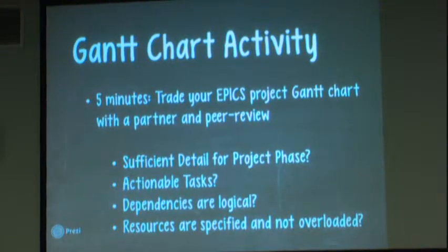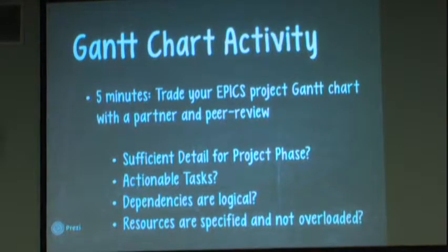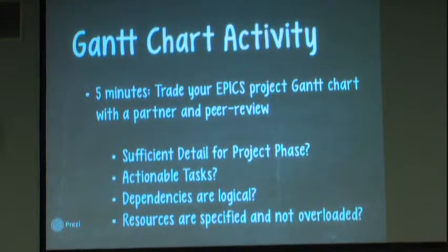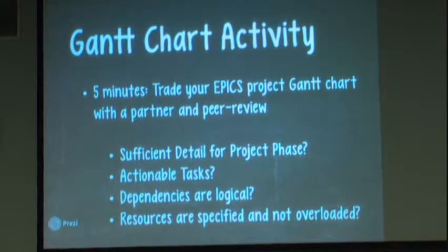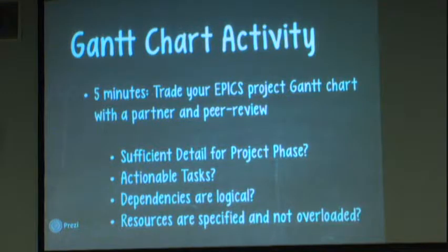Okay? So when you get to the end level of your Gantt chart as your project is getting into its final phases, you should be able to say yes or no, here is supporting evidence for every task on there. Right? So "design the watch face," bad example. "I created a print for the watch face and it's attached here," that's a great example. Okay? So there's the difference.